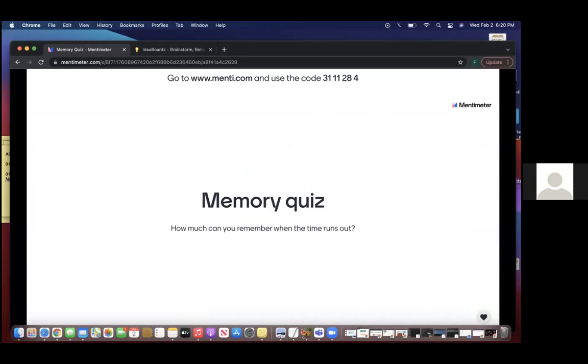All right, so why do we do retrospective? What is the idea behind doing a retrospective? So for retrospective, it's another opportunity to inspect our people, processes, and the tools. There are three unique questions that are going to be answered when you do a retrospective. What did we do well? What can we improve upon? And then what are the action items that we can take out of there?